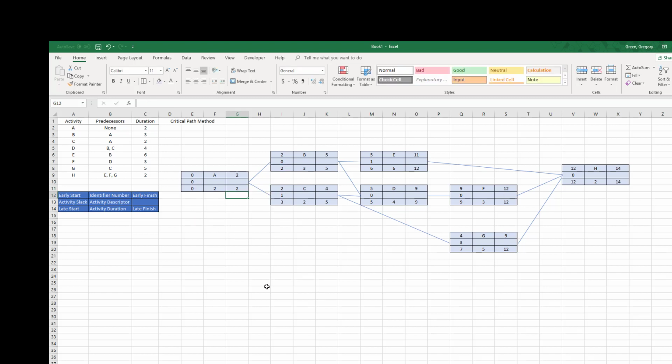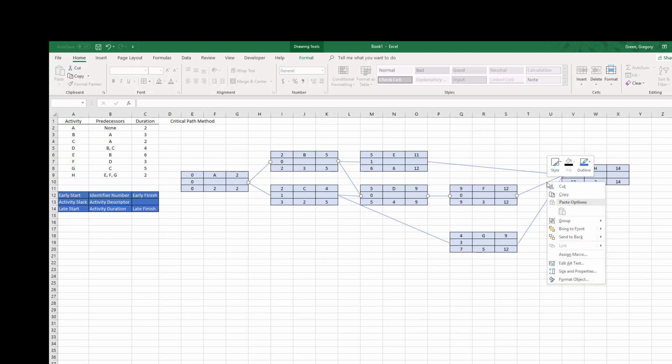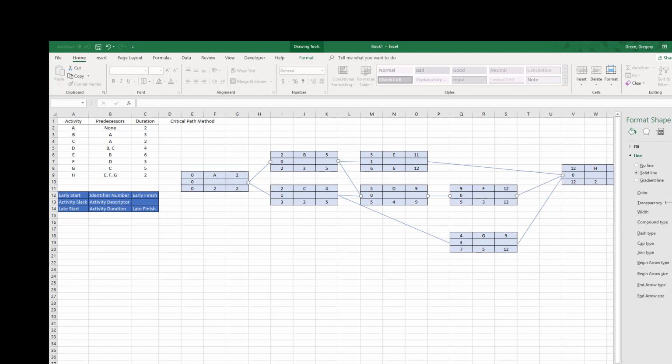All right, well, what do I have now? What I have is the path that's going to be moved through where I have no slack time. In other words, I have to be on time. I can identify that by looking at the slack time in each of these nodes. Everything that has a 0 in it is on the critical path. So all of those nodes, I'll make that path red. The red path is the critical path. I have to be on time starting at A, B, D, F, and H.